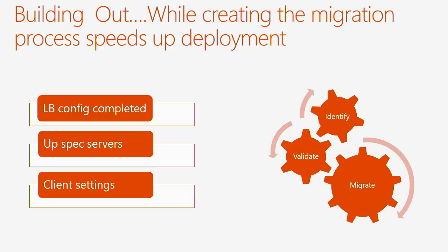We looked at how we were going to migrate our users. We were still waiting for the business to tell us who could go to the cloud and who had to stay on-prem. And in a waterfall scenario, that may have stopped us because you've got to consult, you've got to make decisions, everyone has to wait. But because we were in an agile framework, we didn't need to wait. We could just carry on with trying to migrate as many pilot users as we could find.